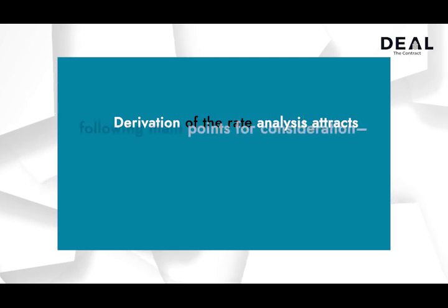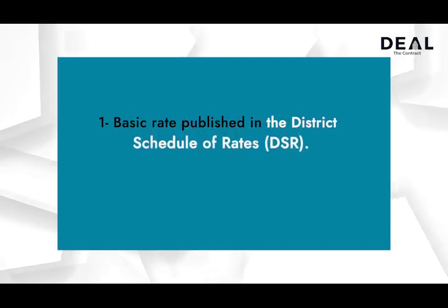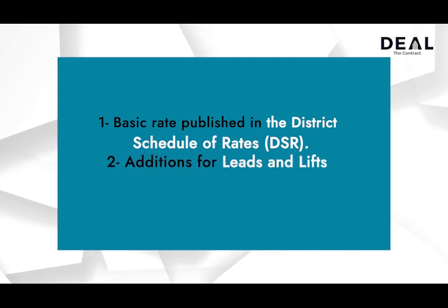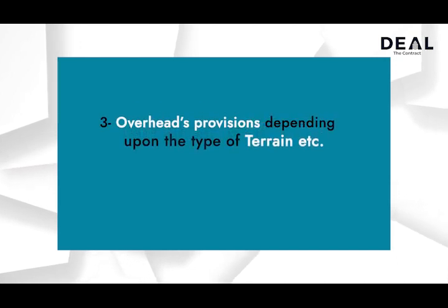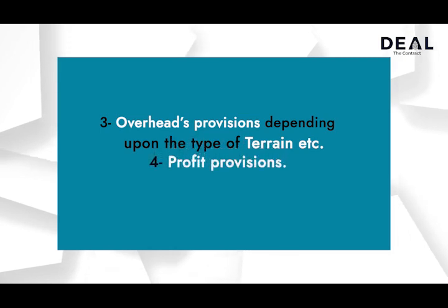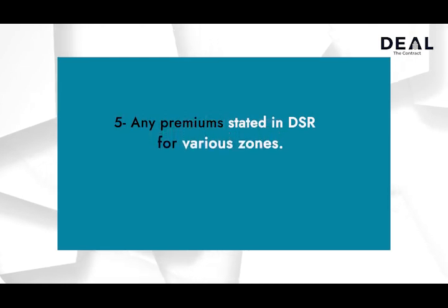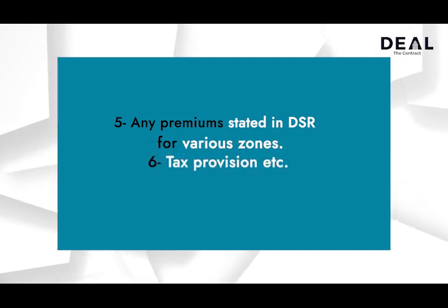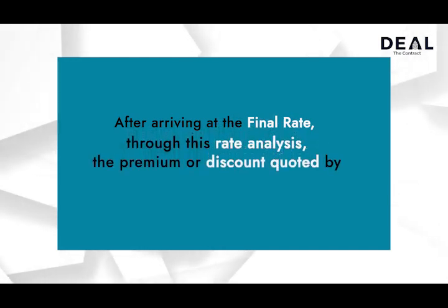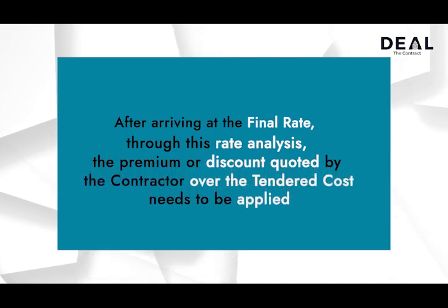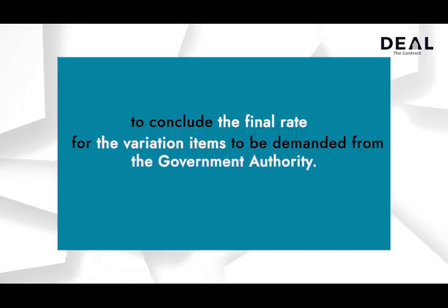Derivation of the rate analysis attracts the following main points for consideration: 1. Basic rate published in the district schedule of rates. 2. Additions for leads and lifts on top of basic rates from the DSR. 3. Overheads provisions depending upon the type of terrain, etc. 4. Profit provisions. 5. Any premiums stated in DSR for various zones. 6. Tax provisions, etc. After arriving at the final rate through this rate analysis, the premium or discount quoted by the contractor over the tendered cost needs to be applied to conclude the final rate for the variation items to be demanded from the government authority.